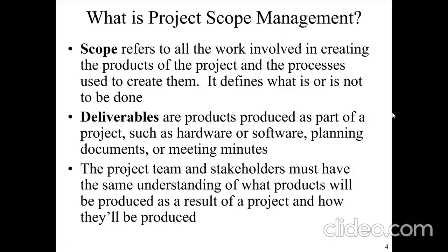So this is a school management system. It includes school fees collection, student records management, examination records management. It does not include payroll. That is your scope you have defined. You have told us what is to be done and what is not part of the scope. And this is very, very important. We have explained along the line why it is important.